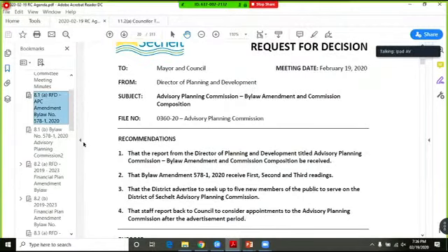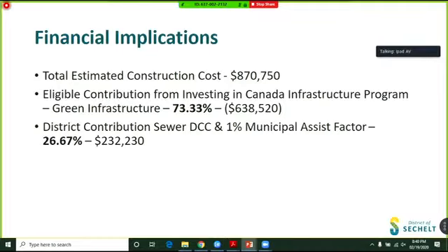Councillor Toth: I'm going to channel the Area E Regional District Director with this question. Is there any ability for us to relocate the lift station further uphill to deal with sea level rise, shoreline erosion, and storm surge? It's mentioned in there, the idea of raising it, but is that going to be enough? The problem is there are two accesses, and two residences on both sides a little bit up. So it is difficult to bring the lift station uphill. Instead, we are proposing to raise the retaining wall by 1.5 meters. That is adequate for 2060, 2070 sea level rise.